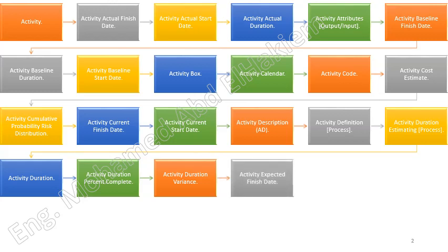Activity expected finish date. A date constraint placed on both the activity early and late finish dates of an in-progress schedule activity that affects when the schedule activity can be scheduled for completion and is usually in the form of a fixed imposed date. This constraint requires the activity remaining duration to be set equal to the difference between the activity expected finish date and the data date to force the schedule activity to be scheduled to finish upon the imposed date.